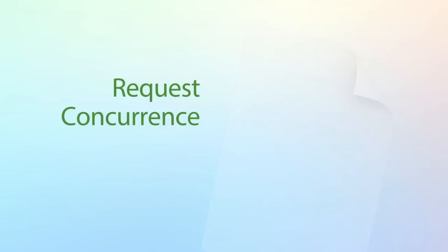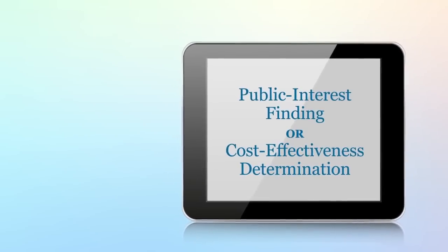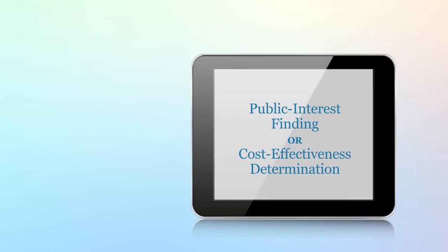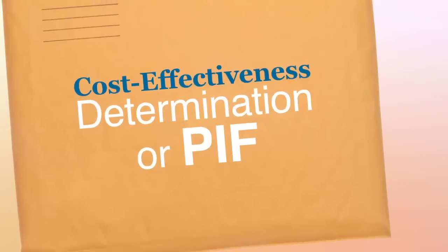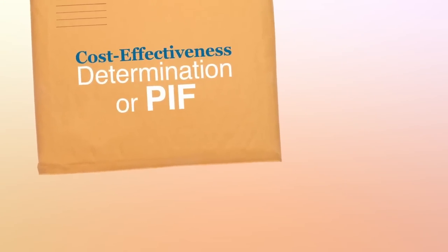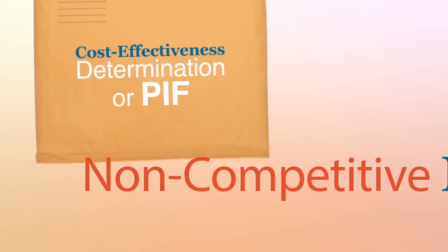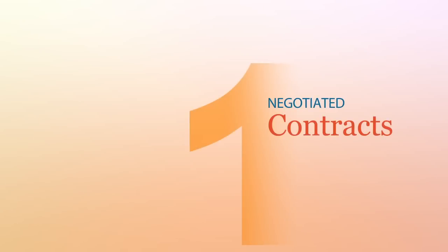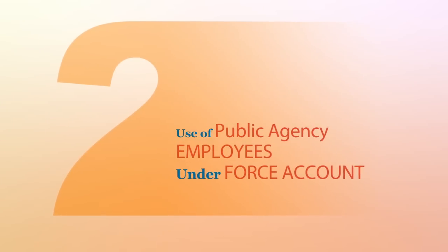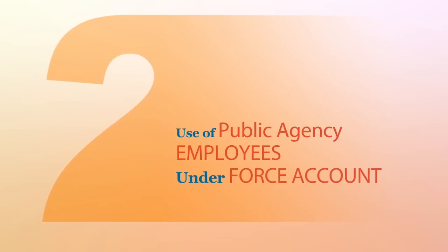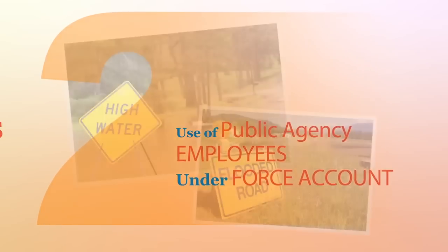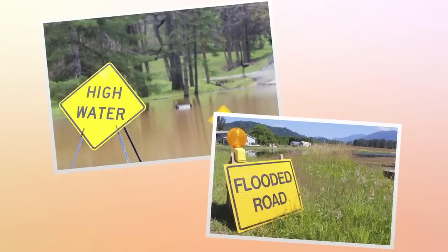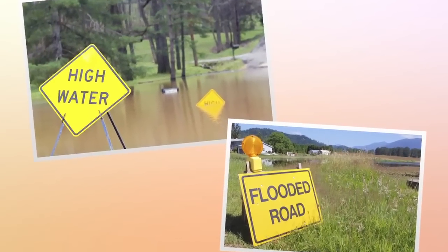You will need to prepare a document to request concurrence by the oversight agency when it is indicated that a public interest finding or cost-effectiveness determination is justified within the Federal-aid regulation. When should you use a cost-effectiveness determination or public interest finding? You must submit a request for a cost-effectiveness determination to use non-competitive methods of construction for a project. Negotiated contracts or use of public agency employees under force account procedures are two examples of non-competitive work procurement. Emergency work within the Federal-aid emergency relief program has a regulatory exception for determining cost-effectiveness.